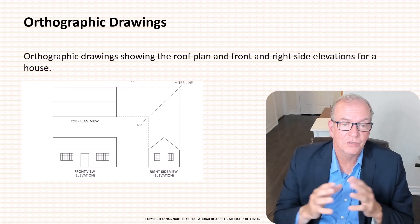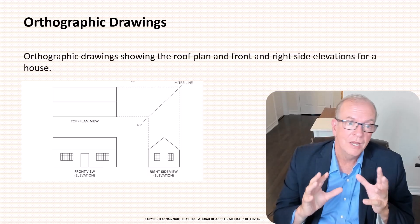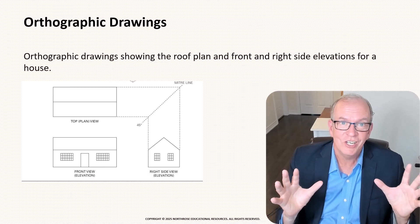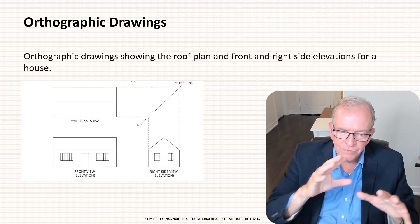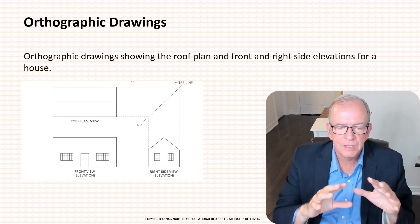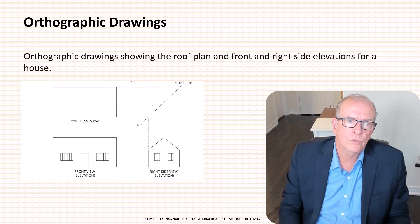being able to look at a set of drawings and say and then look at the other drawings say this isn't correct there's a problem here and then doing what we call an RFI contacting the consultant but doing it writing requests for information to get an answer on well this seems to be incorrect or this is missing this information ahead of time it's gold it's gold